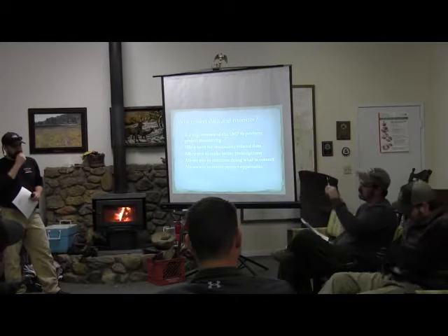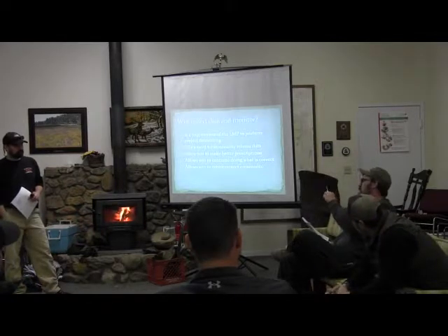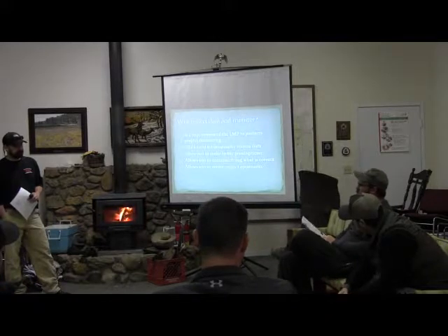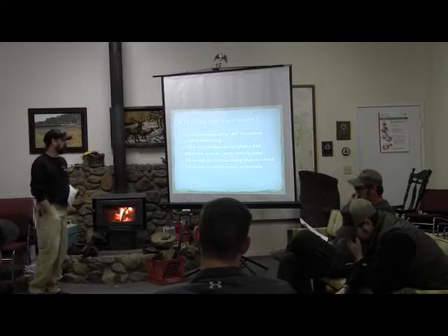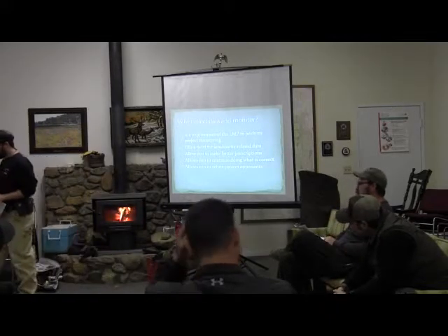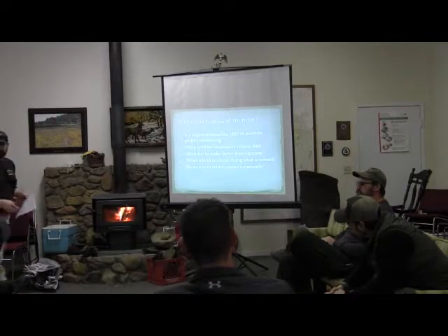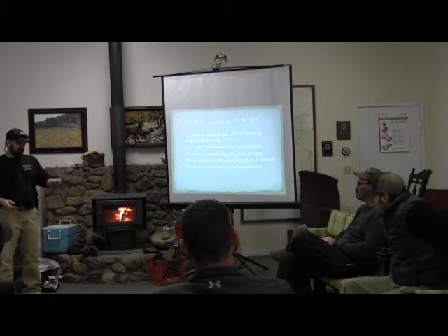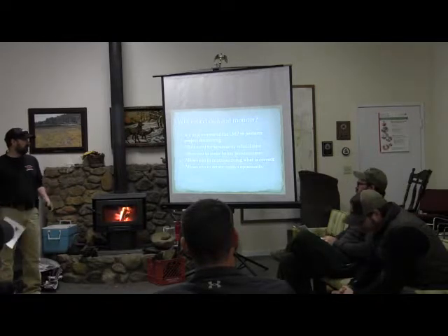If you monitor, let's say, fuel moistures throughout the year, you'll know about what time of year they're going to be right where you can gear up to start implementing your project. Yep, that's for pre-monitoring. That's exactly right. That's the other part of it, especially fuel moistures. And fuel moisture data collection, which probably a lot of you actually participated in, or at least seen. That's monitoring. You're monitoring your fuel load, and that's why you tie into knowing when you're in prescription.